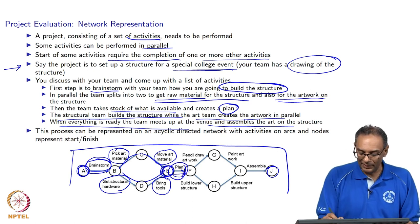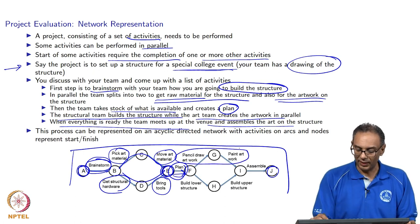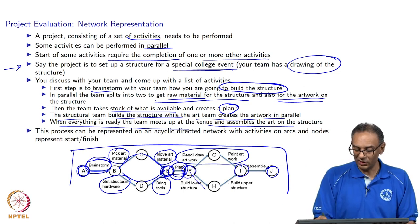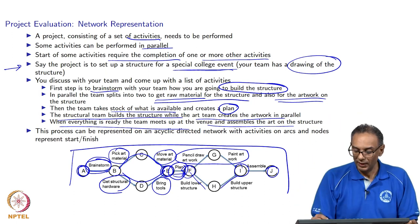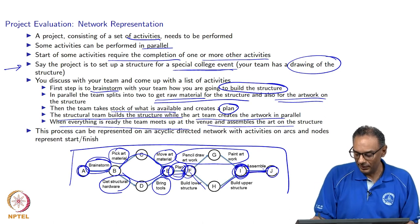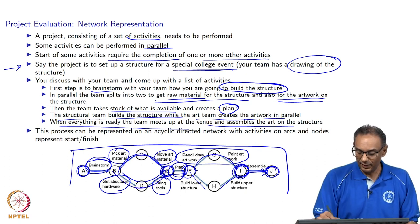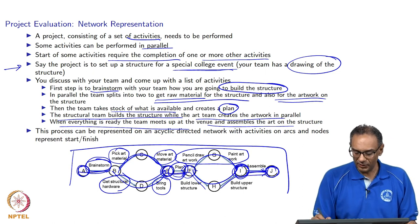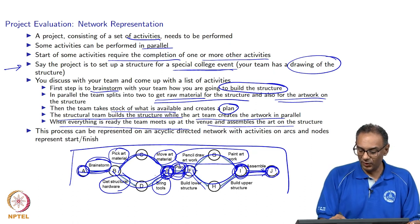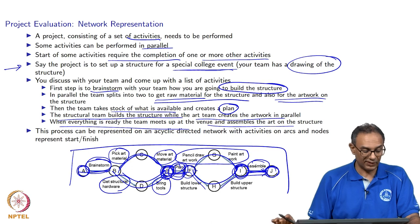Once we have all the materials at node E, we wait for whichever of the parallel activities finishes last, then sit down and plan. After planning, the art team can go ahead and pencil-draw and paint the art, while the structural team builds the lower and upper parts of the structure — both in parallel. Once everything is done, they bring it to the venue and assemble it. Notice that some tasks can be done in parallel while others must be done in series — for example, to start planning you must wait for both prior activities to be complete.